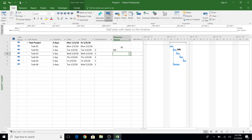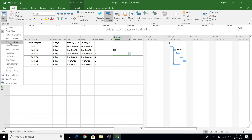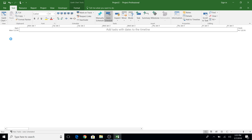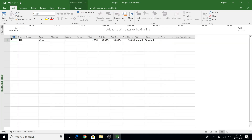The third thing that you want to set up is your resource sheet. If you have multiple resources in your project, it's always a good idea to set that up front. In MS Project, go to the Resource tab and it opens up a resource sheet where you can key in your resource name, initials, and other details.